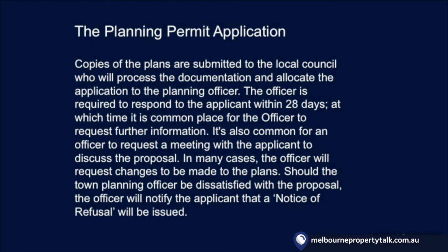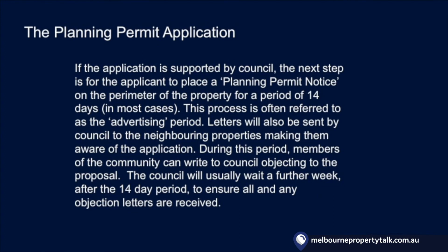It's also common for an officer to request a meeting with the applicant to discuss the proposal. In many cases, the officer will request changes be made to the plans. Should the town planning officer be dissatisfied with the proposal, the officer will notify the applicant that a notice of refusal will be issued.